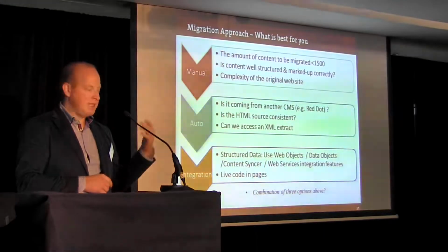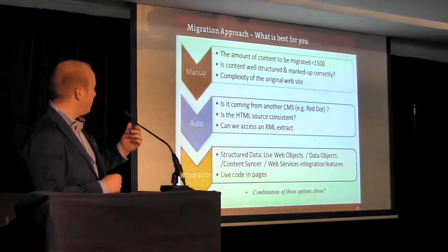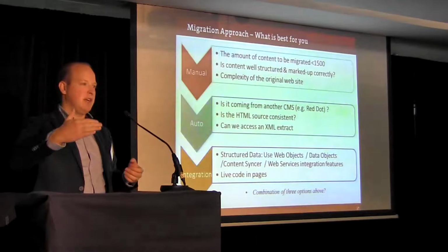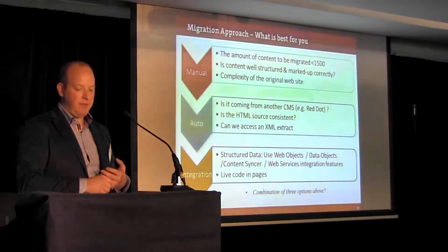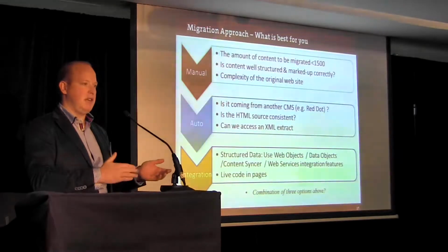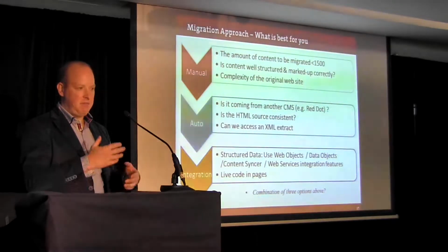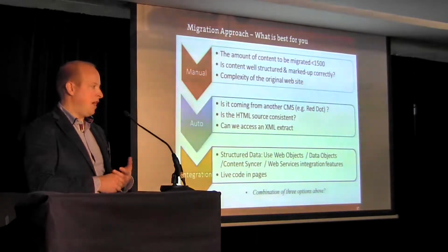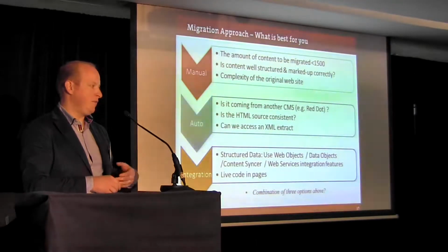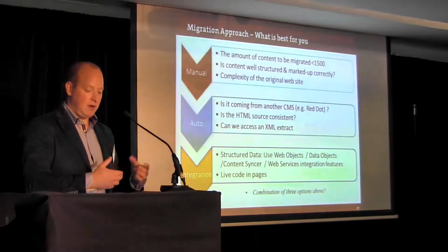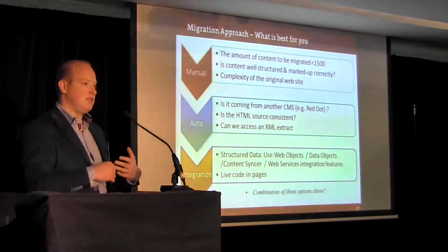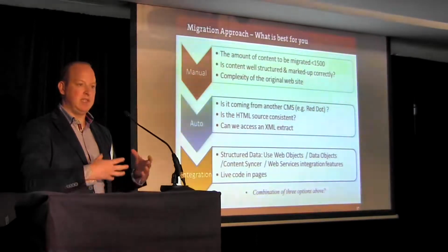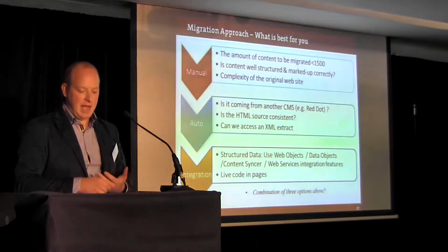Yesterday we were actually talking about this. With manual, where does it become efficient to start looking at using the HTML importer? Generally we would have said around the 800-900 page mark, but things are becoming a lot faster, and we have a process for manual migration that's become a lot more slick over the last year. So at about 1,500 pages, we will tend to just go manually at it, and we'll set up a process to do that with you.